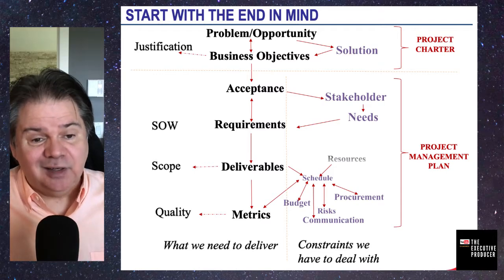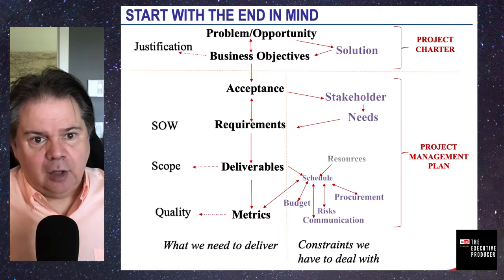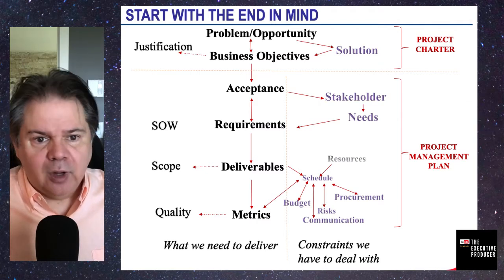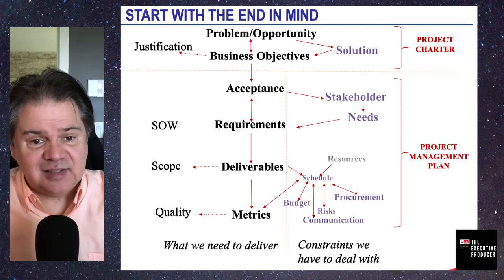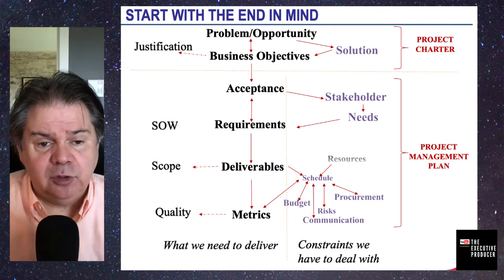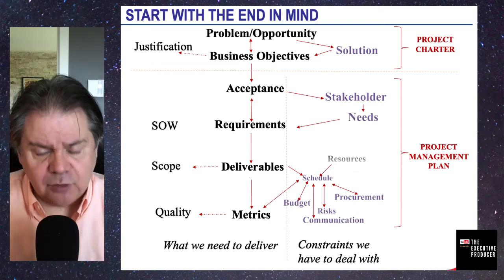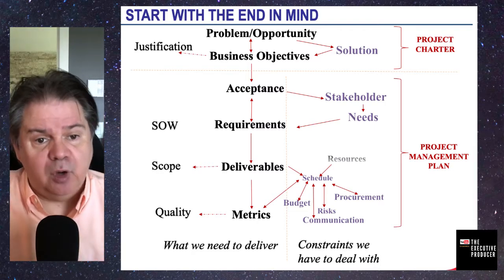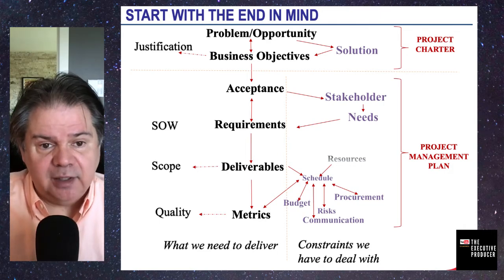You have authority to allocate a resource on your function. If you are a director of IT, yeah, you could allocate money to do support to your service, you upgrade whatever you are doing on ongoing operation. Yes, you do. But having authority on investing in a project should be higher up in the organization with a management committee, typically depending on the governance, or maybe a higher sponsor that do have this authority. The point is, we need to go and get the authority, and the charter is raised, and that's the trigger to launch, and go ahead and start planning the project.